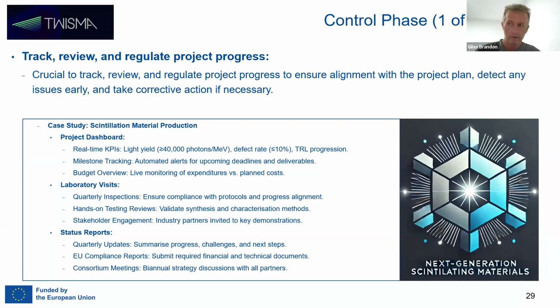Laboratory visits. So especially in the context of, say, the principal investigator and the project manager, it's really good if she or he is proactive, that they make laboratory visits. I've written here quarterly inspections. I think probably even more regular than that. It's good that they go out and check that there's compliance with necessary protocols and see progress, and perhaps more importantly, they're hearing from the foot soldiers, from the researchers, the scientists, what are the challenges, what are the issues they face. So they hear that really early on.